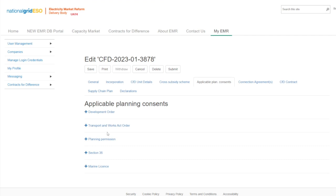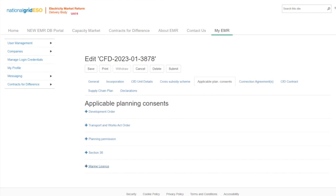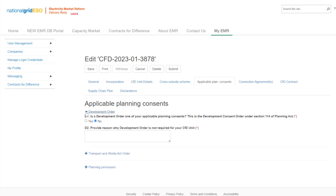Any uploaded documentation in these categories must include a signed and dated planning decision notice. Starting with the Development Order, this is the development order consent under section 114 of the Planning Act. If a development order is one of your applicable planning consents, then this must be provided. Answer Yes to question D1 and provide the file in D1A.